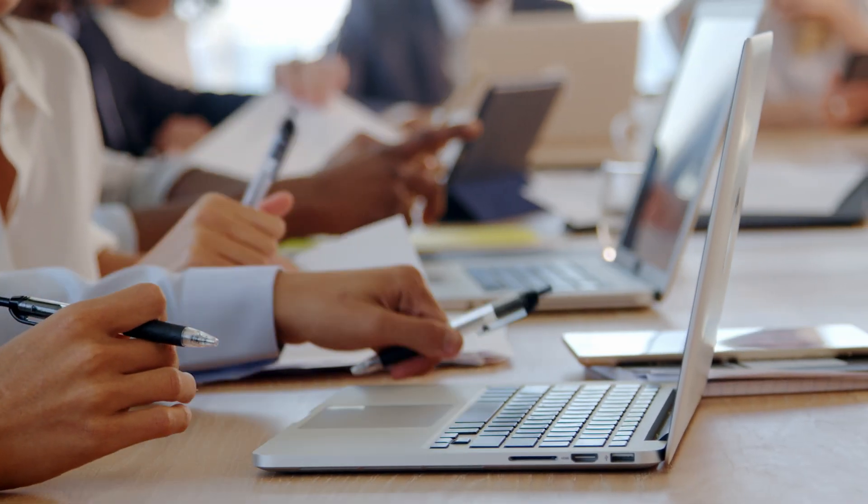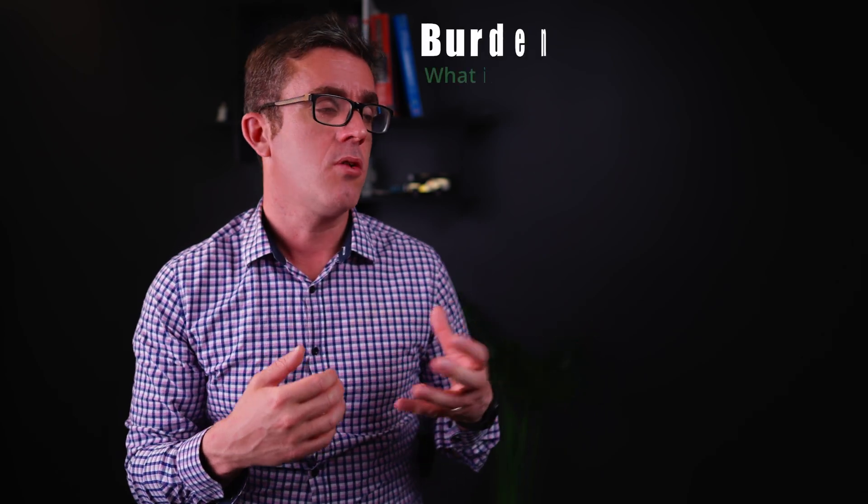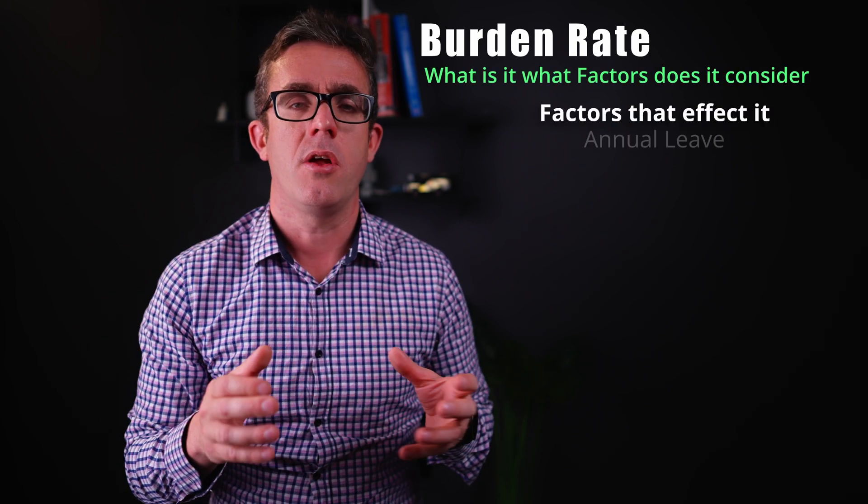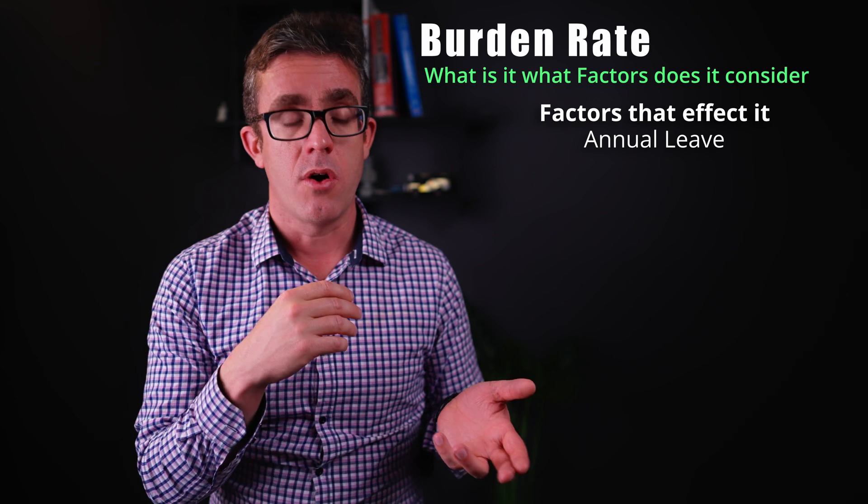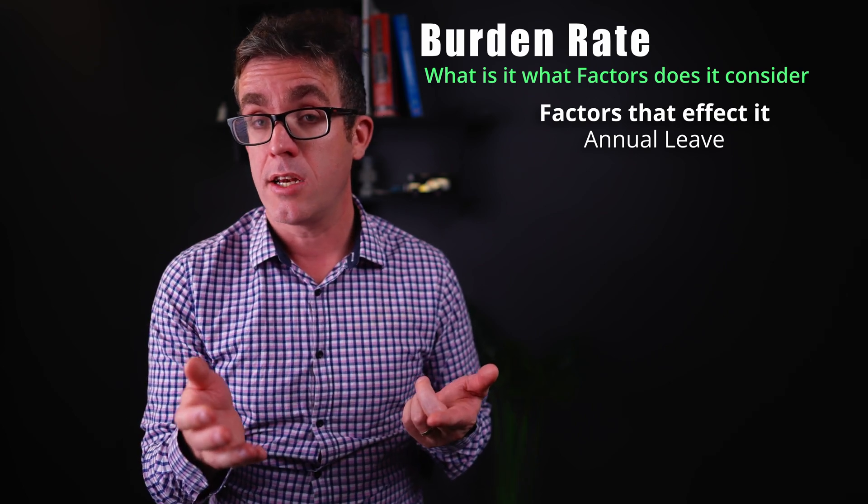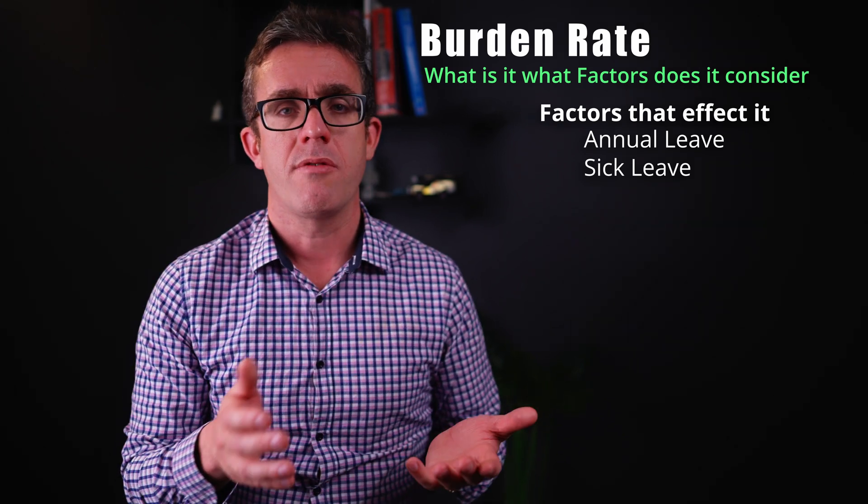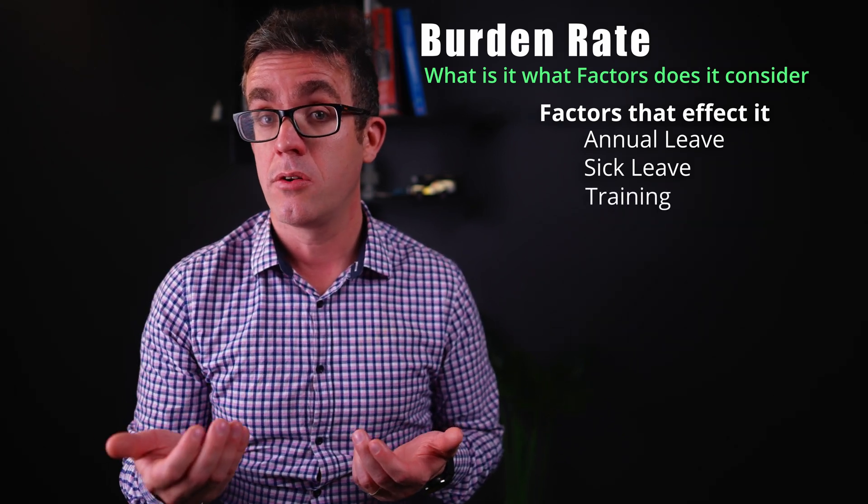When you're developing the fee, there's other things that you need to worry about. You need to work out how much each person is going to cost, and this is normally considered something like the burden rate. What is the burden rate? The burden rate is not actually how much you cost per hour, because when you're looking at how much you cost, there's a lot of additional things you need to add to that. For example, if you've got one colleague, he may go on holidays, so they need to be factored into the fee. He may have sick leave as well that needs to be considered in the fee, and whatever training you may need to pay for him to do.